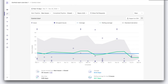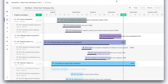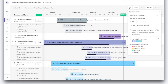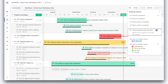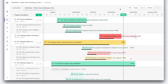My favorite thing — you remember those epics we just looked at? Zenhub adds roadmaps. The Zenhub roadmap allows you to see at a glance the progress of all the epics on your board. The green line acts like a pace line: if the progress bar is to the left of the green line, you are behind; if it's to the right, you are ahead. You can also flip on the automated risk assessment, which color codes those epics red, yellow, or green depending on how far from the date line you are. You can also turn on a predicted end date that tells you when a project may get done, based on remaining work and the rate your team has been closing things.